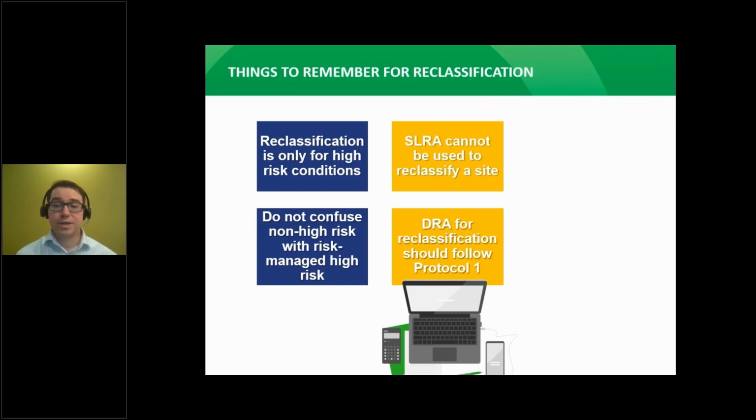A screening level risk assessment cannot be used to reclassify a site. A detailed risk assessment is required. If a detailed risk assessment will be used to reclassify the site, it is always good to double check with the statutory decision maker to see if the risk assessment should include all potential risks. When completing a detailed risk assessment to reclassify a site, please follow Protocol 1. Risk assessments must be thorough, especially for high-risk sites. A fee for the risk assessment report review will apply.